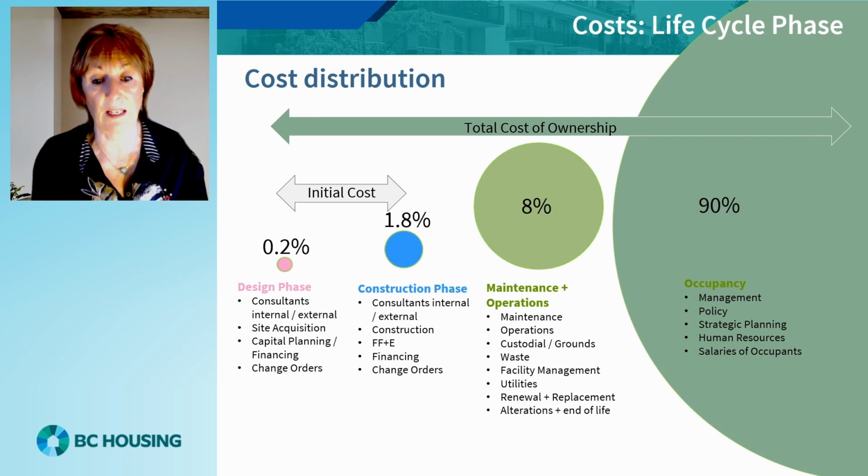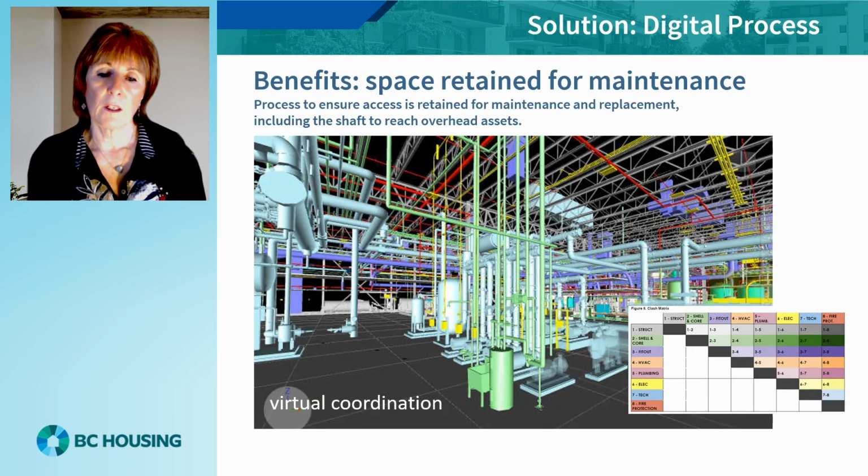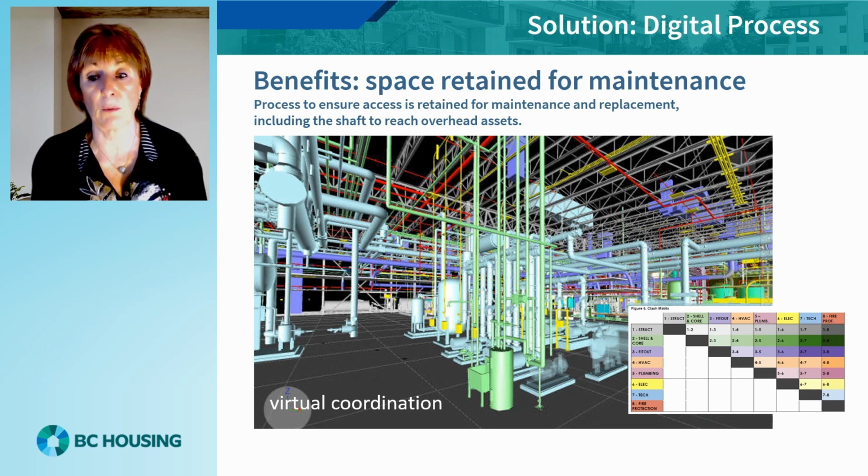In essence, again, design time is cheap time, and it is here that the greatest downstream benefits can be achieved. High quality, rich design data is the foundation for associating installed asset information that is used for the life cycle of the facility. Virtual coordination provides the opportunity for the design and construction teams to ensure that sufficient space has been retained to enable maintenance and replacement of equipment.